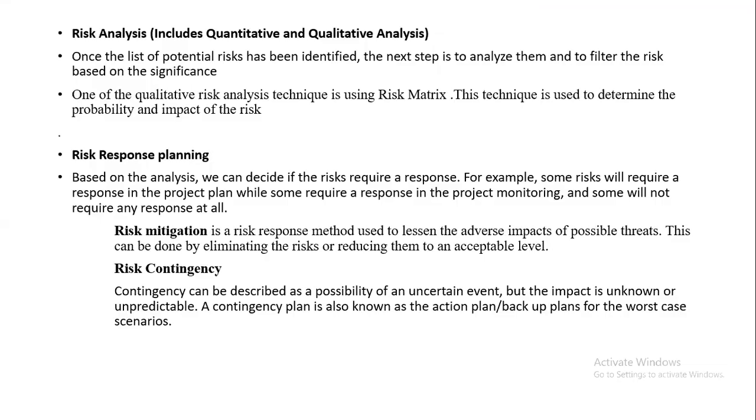So we have done the risk identification, that is done. Then what is the second thing we need to do? That is risk analysis. Okay. So risk analysis can be quantitative or qualitative. In both ways we can do it. Once we have identified the risks, we need to analyze them and we need to filter the risks based on their significance. So that is the next step we need to do while analyzing the risk.